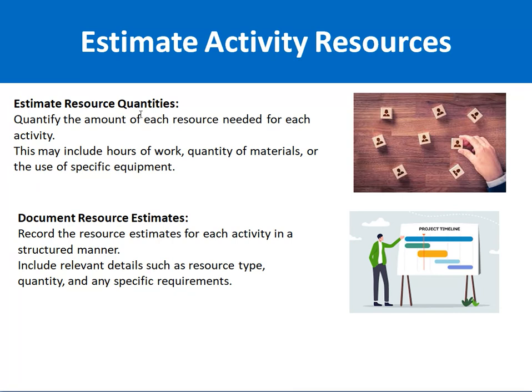Then document the resource estimation. That means record the resource estimates for each activity in a structured manner. You can use Microsoft Excel, where you can record such as resource type, quantity, and any specific requirement. For example, for software development you need two resources, one senior resource and one junior resource. So in that way you can make an Excel sheet. It will be very helpful for you.